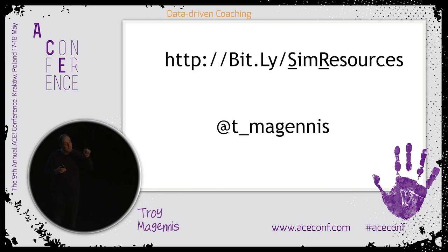So your job of your quality metric is to make sure that bug debt and defects are paid off continuously throughout the project. So you've got to think about what can I show that encourages people to continuously log and fix the defects at the first possible moment in time. So it's not about driving defects to zero. It's about making sure that it's paid off continuously. It is the toughest metric that you're going to have to find a way to not cause bad behavior. So I'd love your ideas on quality. It's the one I struggle with most.